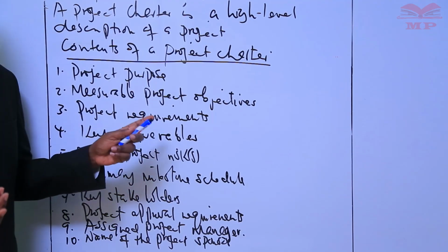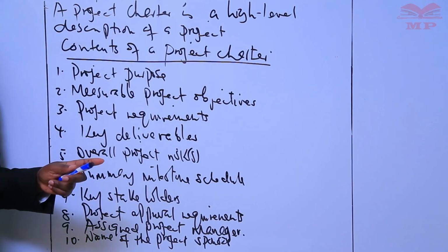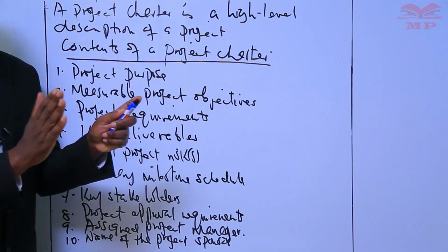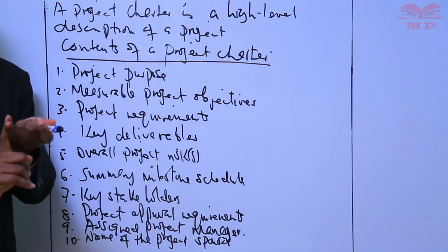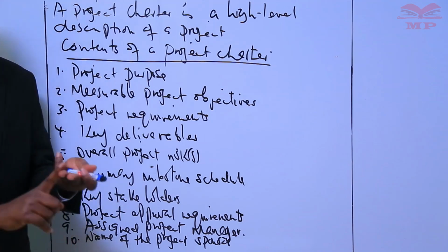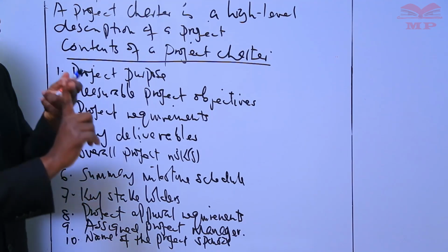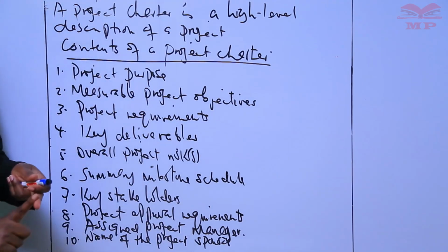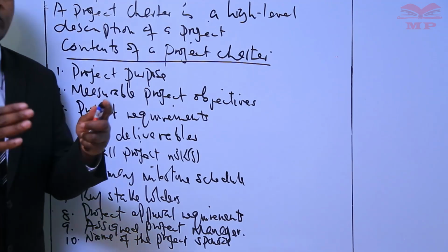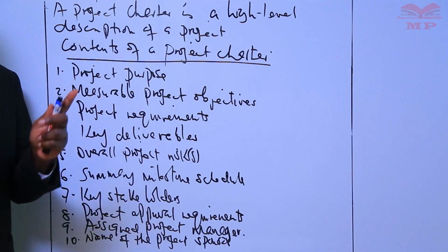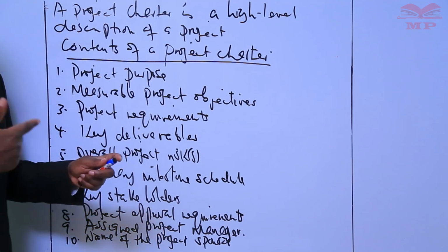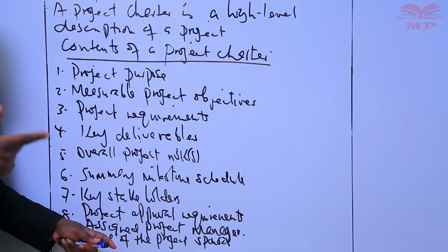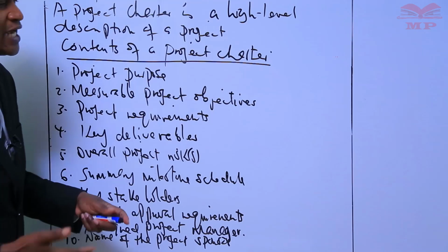And candidates, I need to mention that the project charter ensures a common understanding by the stakeholders of the key deliverables, the milestones, the roles, and the responsibilities of each and everyone involved in the project. And once the project charter is approved by the project sponsors, then the project is considered to be officially authorized, and work on developing a more detailed project plan can commence.